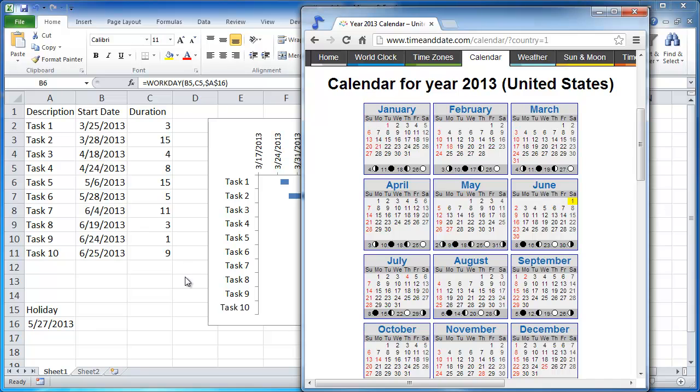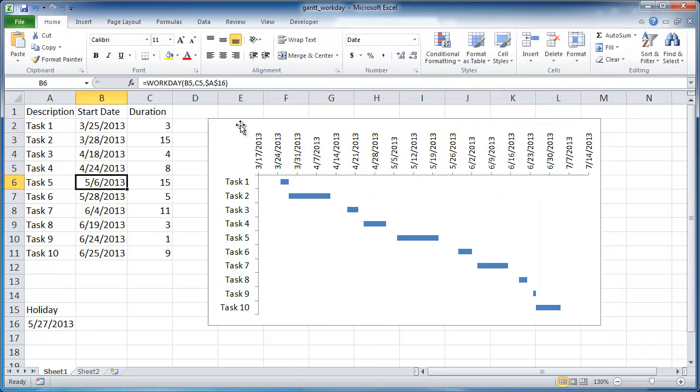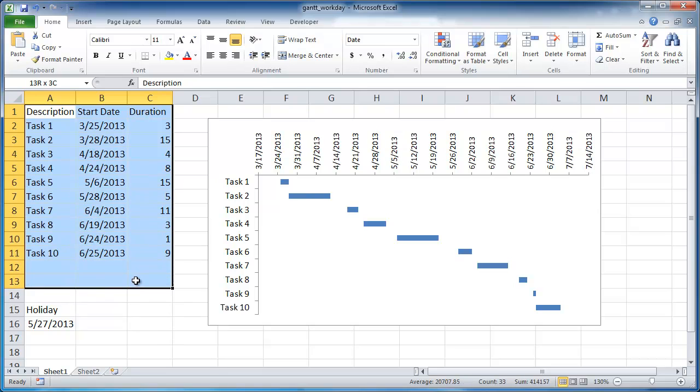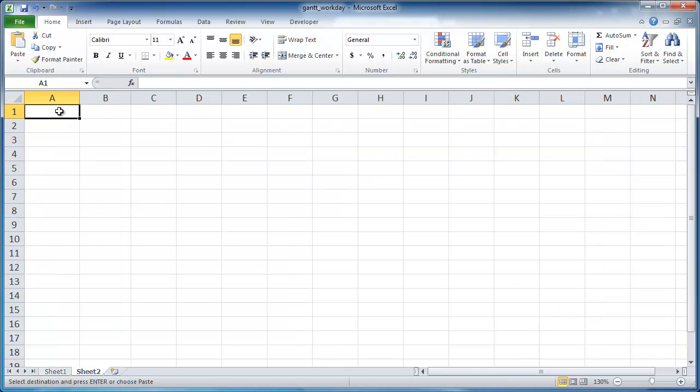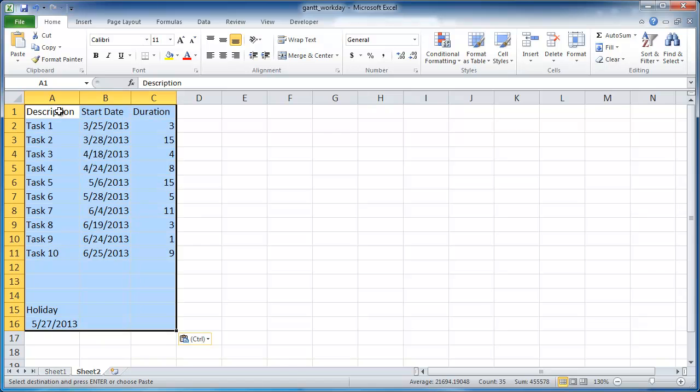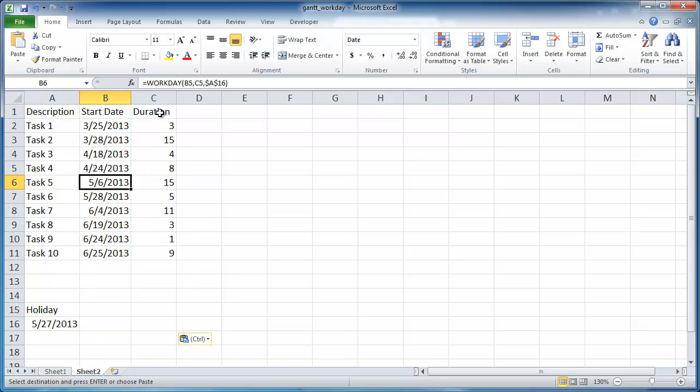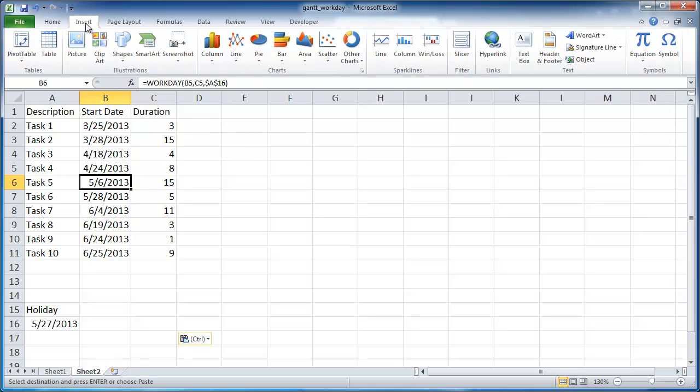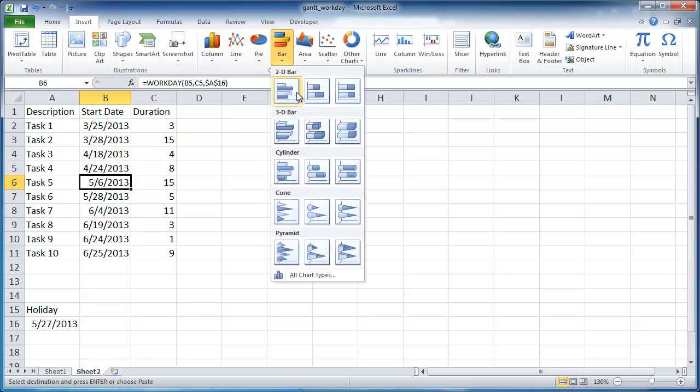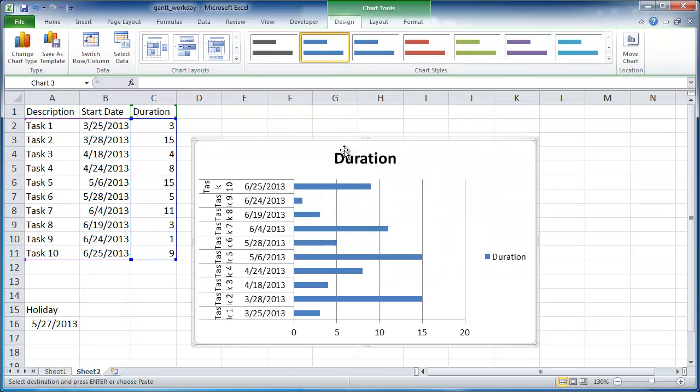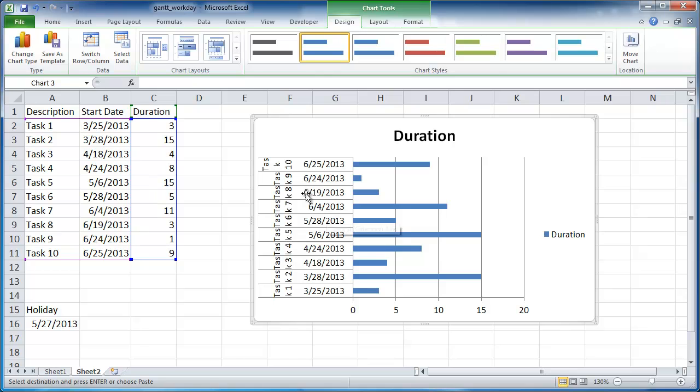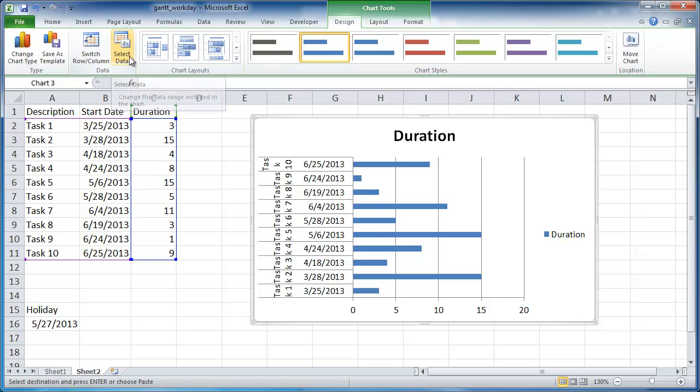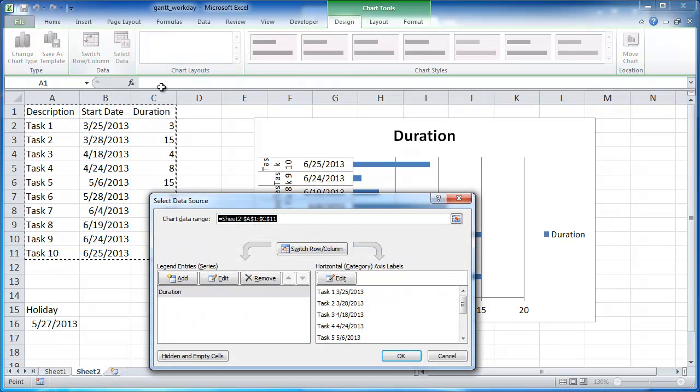Let me go ahead and show you how to create this. So first off, let me go ahead and just copy this. Let me copy this table and this holiday here. Let me do a command, control C to copy, bring it into this other sheet and do a control V to paste. So what we need to do is we want to insert a bar chart. I'm going to go up here and do insert bar and we want to insert a stacked bar chart. So once I insert this bar chart it's going to take some of the data already. Excel tries to guess and take the data in here.